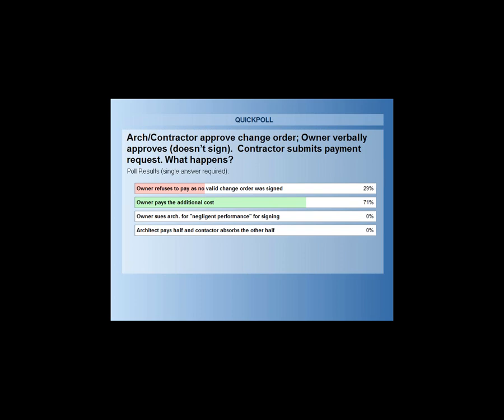But finally, the owner's approval, in air quotes, really constitutes authorization, and the contractor has an affirmative responsibility to ensure the owner signs. Another one just popped in here from John as well, saying the architect's approval is with appropriateness of costs associated with technical scope, whereas the negligence is if the contractor proceeds to execute without the owner's approval.